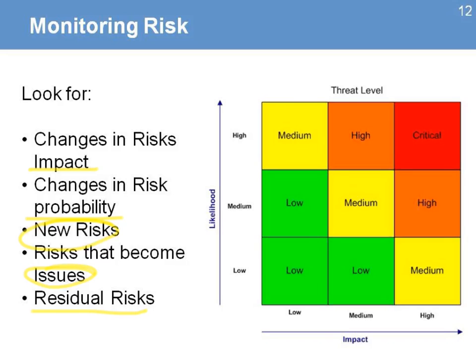Residual risk is an important concept. It means that sometimes you will have some actions to either avoid the risk or reduce the impact, and you implement those actions. But because of the lack of understanding we had about the risk, there may still be some residual elements of that risk that might become a problem for the project. So don't always assume that because you implemented some actions to avoid the risk or reduce the impact, the risk is completely gone. Make sure that you have a better understanding and try to analyze the situation so there are no residual risks as part of the actions you took in the project.